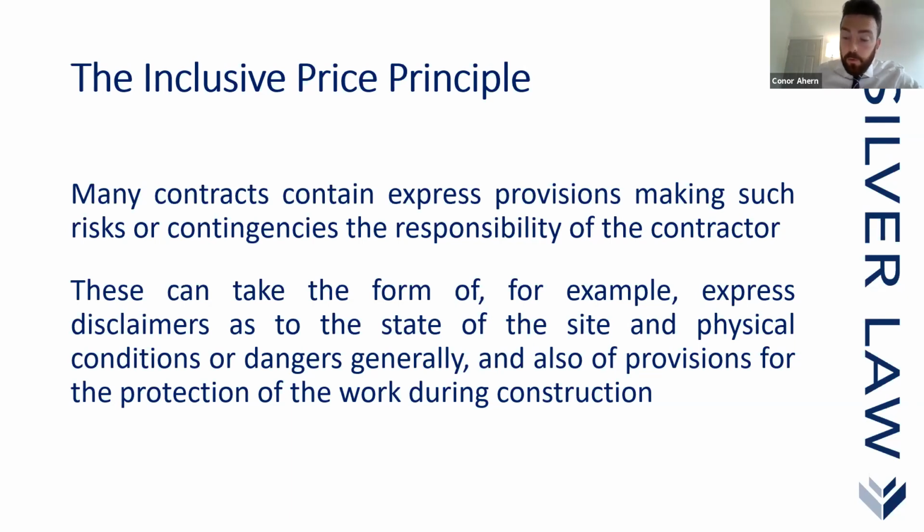Another clause is the no reliance clause, where basically the employer is saying that you can't rely on it. I'm giving you the information, you can use it as you wish, but there's no reliance. You can't rely on the information or rely on the fact that if it's wrong, you're entitled to a variation. Again, it's all setting the scene for the contractor that unless he adequately reserves the position, he's going to really struggle to get his variations or applications for time off the ground. So again, it's just another warning to contractors.